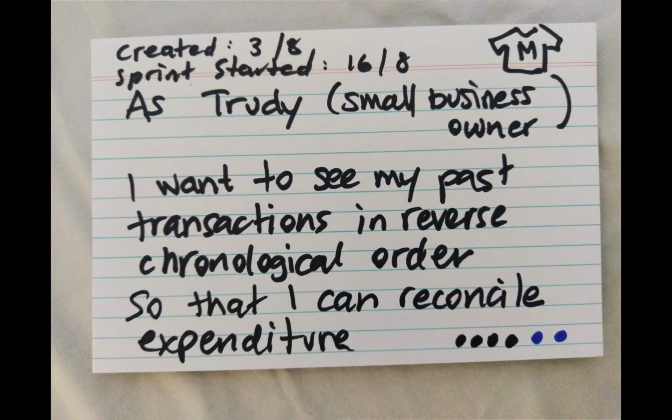Now you notice there's 2 different colours. We've used black for the number of days that the team is actively working on it, and blue for the number of days that it's been blocked by some sort of external dependency. This helps us differentiate between the amount of effort that the team is contributing to a feature versus the amount of time that they might have to wait for someone else outside the team or even for the client to give feedback.